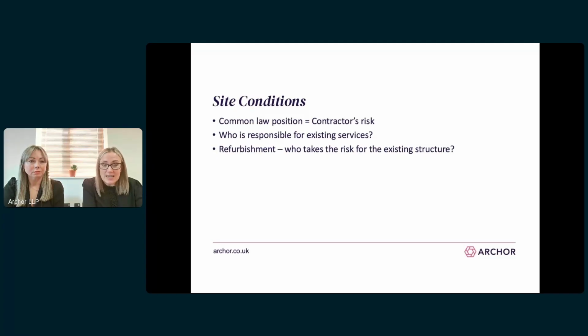We often see, I would say in at least 90% of the schedule of amendments that we review, amendments to the JCT suite of contracts to cement all site conditions as a contractor risk. And the reason for this is often to ensure that there are no arguments concerning discrepancies between or errors within existing site surveys, which might push the standard site conditions risk back onto the employer, and also to push anything that would otherwise have been an employer risk, such as existing structures, onto the contractor.